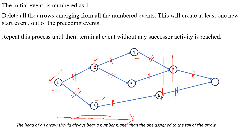Next, the last one — the end event — I give the number 8. Here I have to check once again: the head of an arrow should always bear a number higher than the one assigned to the tail of the event. We once again cross-check that the head event should always have a higher number than the tail event in the respective activities.